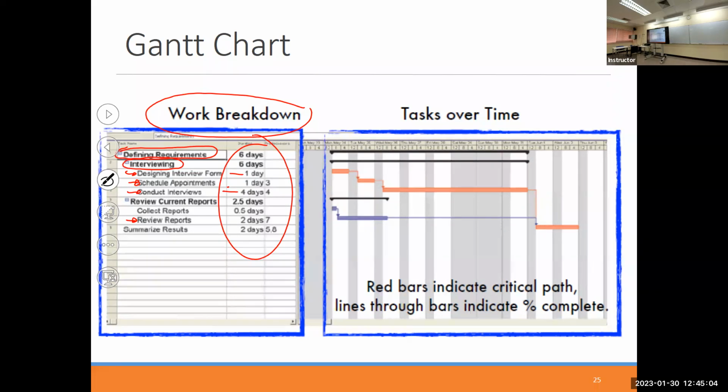But if you need 1 hour per interviewee and you have 5 people in your team, then 5 of you can work in parallel. Then you need only 2 hours in total to conduct the interviews, because you can do this in parallel and so on. Okay.